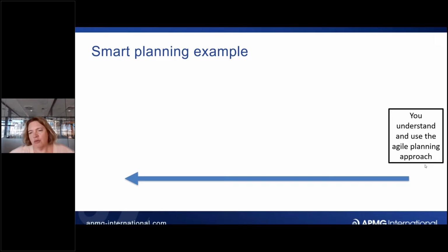So here, Mark wants a webinar on agile planning, right? Okay, well, what's the result of that then? Because the end goal isn't the webinar, it's the result that you have. What's the shift I create for you? You understand the agile planning approach, you understand roadmap and decomposition, that breakdown, and you can use it.